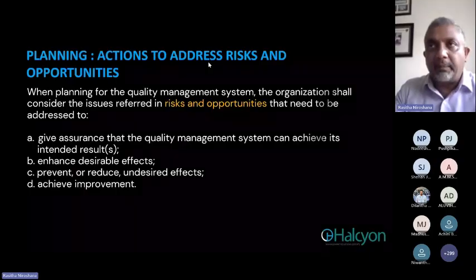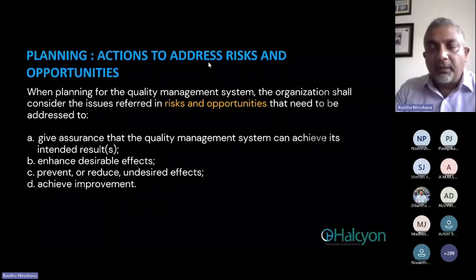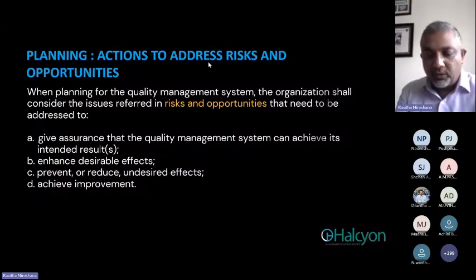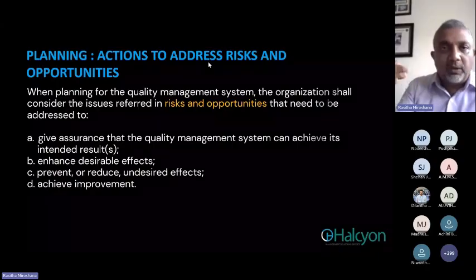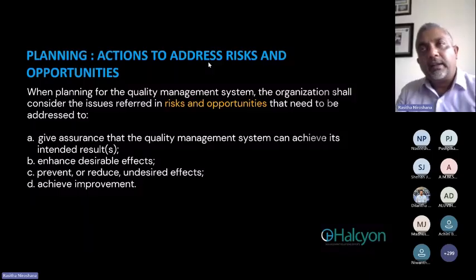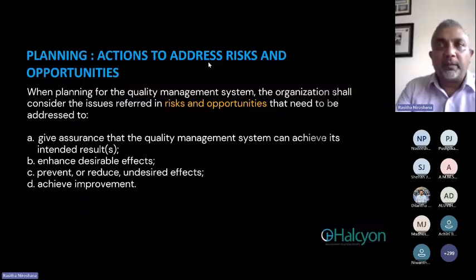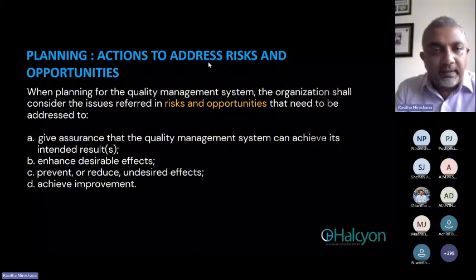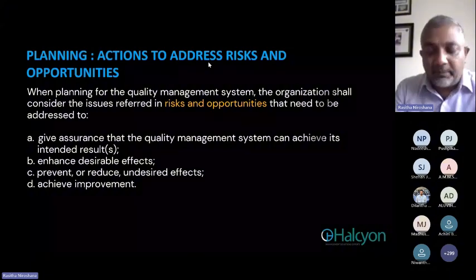And if it is microbiology, are you doing pathogens? Are you doing food testing or wastewater? Then you need to have a separation. So you plan it out, and then you need to allocate team members. There will be people who manage the funding, a team who work on the infrastructure, the engineering team, and a technical team who purchase the equipment. So there has to be a project plan, timeline and all.